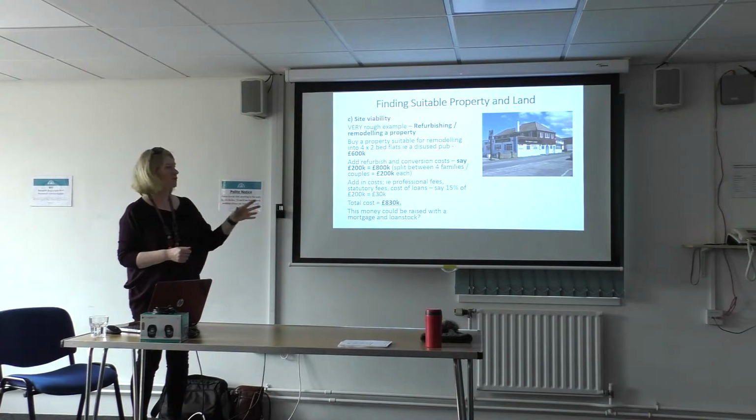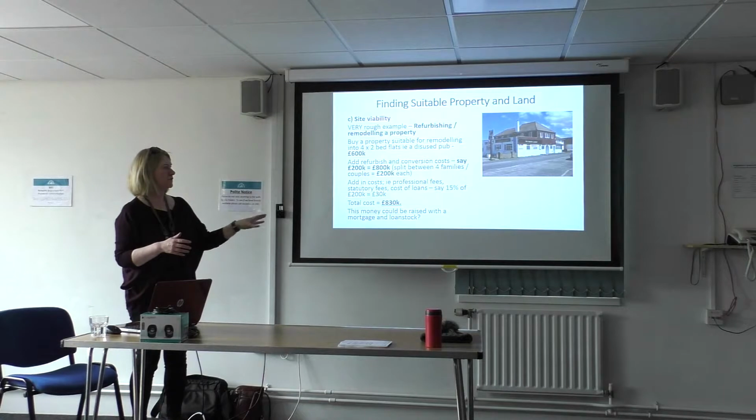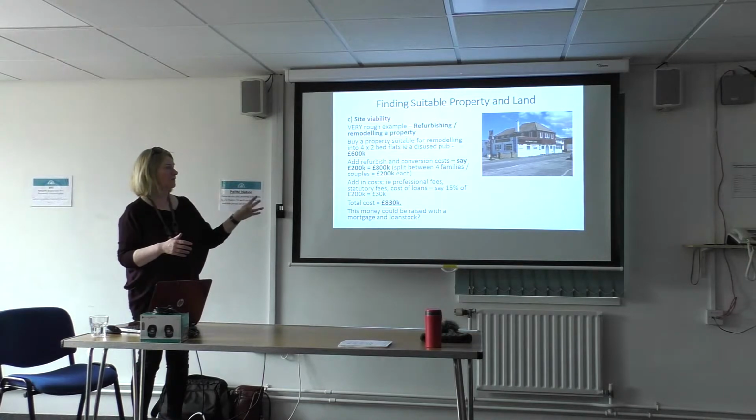You have to add in your costs for professional fees, statutory fees and planning applications, building regs, that sort of thing, and any cost of any loans. So say 15% of the 200,000, which is about 30k. So the total cost of that development could be about 830,000.